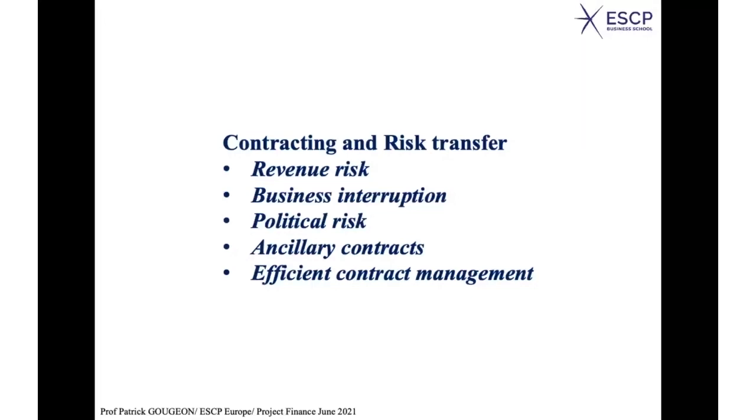The political risk is also an issue because many projects take place in countries where you have a kind of political instability. Even though it's maybe not the case of Vietnam, I think it's good for you to know, if you do business in the region, that there are some regions where political stability is not that strong, or there is a risk, and how to deal with it. Insurance would be the solution, basically an insurance policy, which is a kind of contract, by the way.